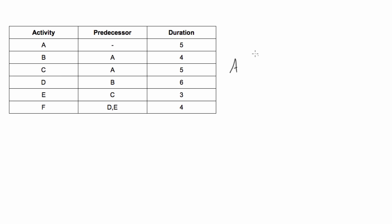Then B and C both depend on A, so we have B depending on A and C depending on A. Now D can start once B is done, so we get activity D. E can start once C is done, so we have activity E coming off of there. Lastly, activity F can start once D and E are both done, so these both lead into activity F.